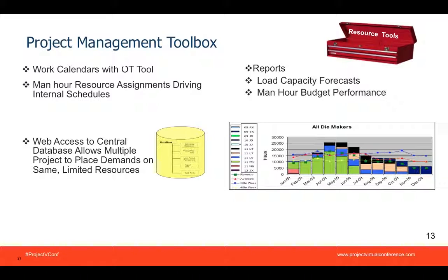So multiple projects can place resource demands on the same limited resources. These resources are then fully integrated with the schedule. In other words, the resource man-hours drive the schedule. The more the resource man-hours, the longer the schedule. The more the calendar time, the shorter the schedule.